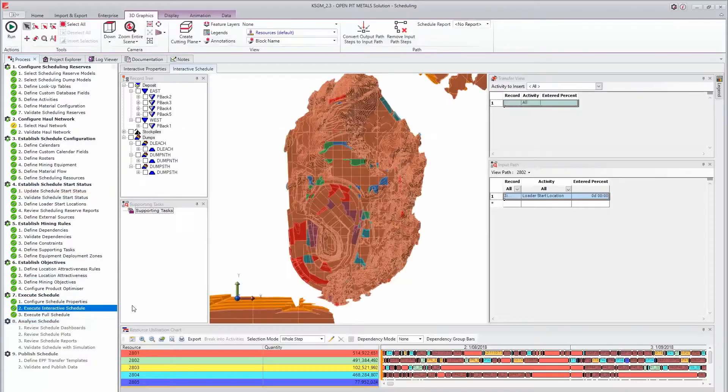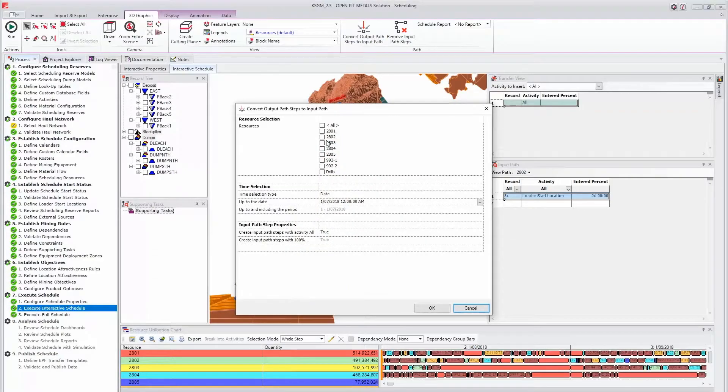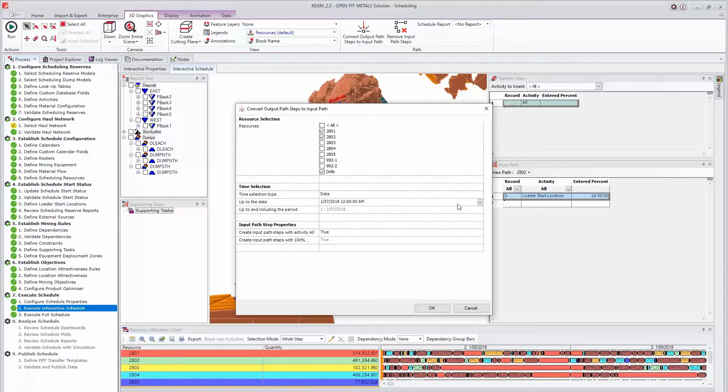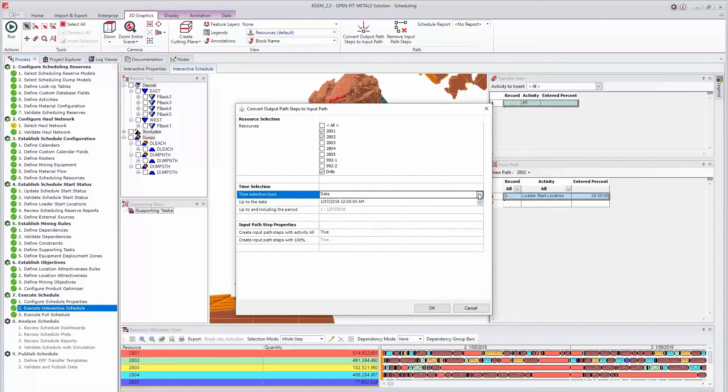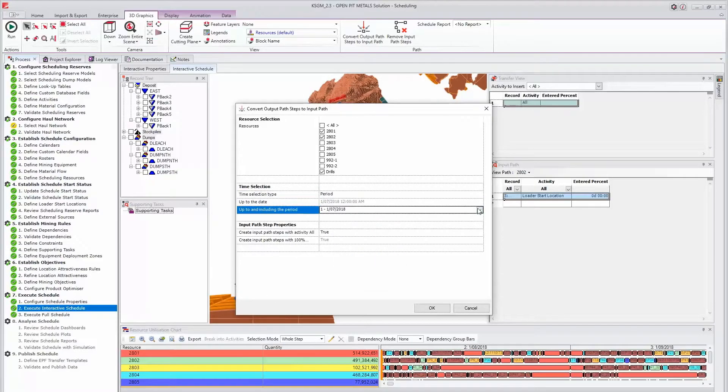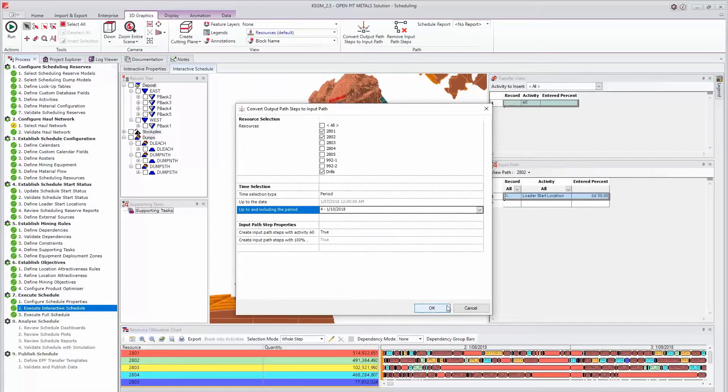If you wish to convert the first three periods after a one period pre-schedule, you will need to select up to and including period four. If you have any before or after extraction activities, such as drilling, you may need to convert the output paths for these resources as well.